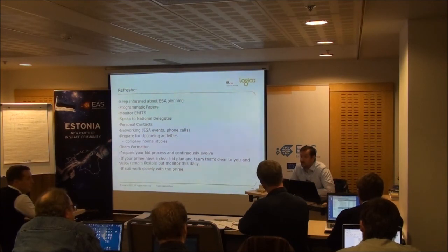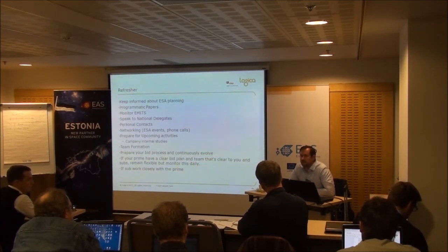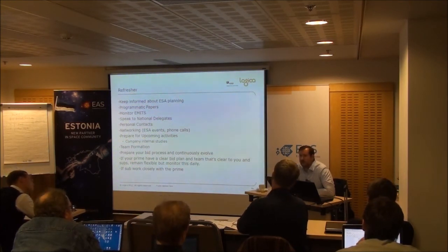You're working on a piece of onboard or with a launcher or something else where there's potential safety aspect, then your damages can be substantial. Yeah? So you do need to be aware of that. Studies and things, they're pragmatic generally. But they'll be clear of what's expected from you and how much damage you're expecting to cover. In general, subcontract arrangements tend to push that down and back-to-back contracting.